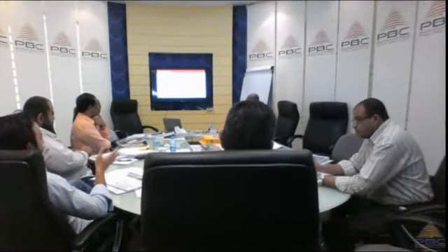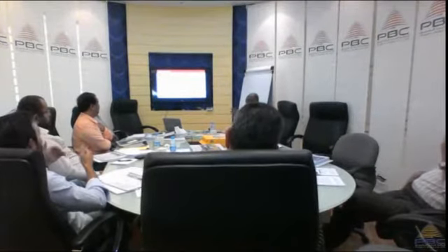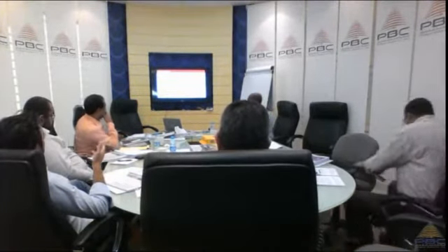So who helps the project manager in doing this? We have procurement, but mainly you have a person called the project accountant or cost control engineer. The project accountant is the one who provides the data, the history of what's going on: what is our budget, what is the expenditure, how much money is spent, what is the actual cost. We'll explain now in earned value.